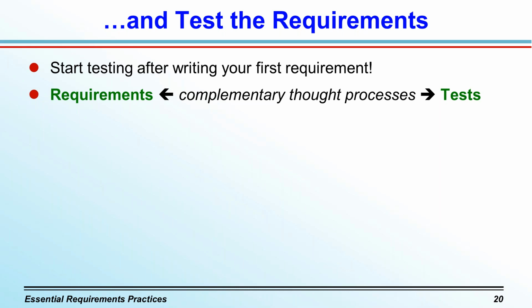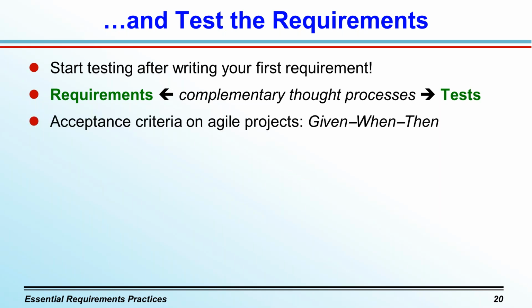So I could fix all that stuff quickly and cheaply. It's even better if you can use two entirely separate brains to write the requirements and the tests, starting from the same information sources, like a use case or some stories. That's a good way to discover ambiguities where people interpret something differently, or gaps.